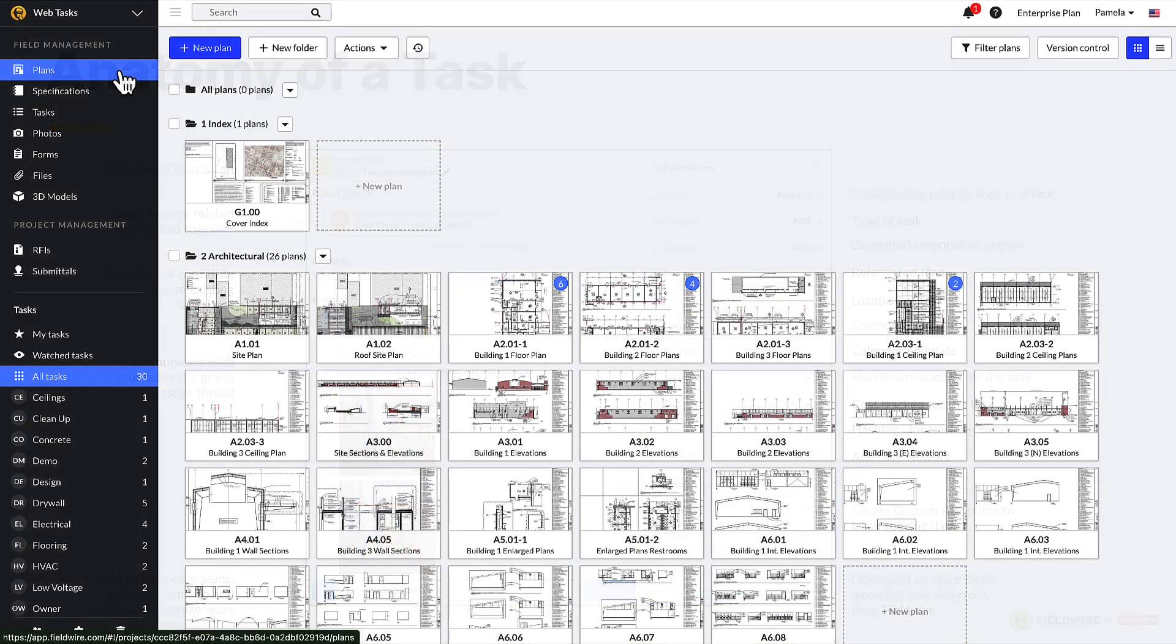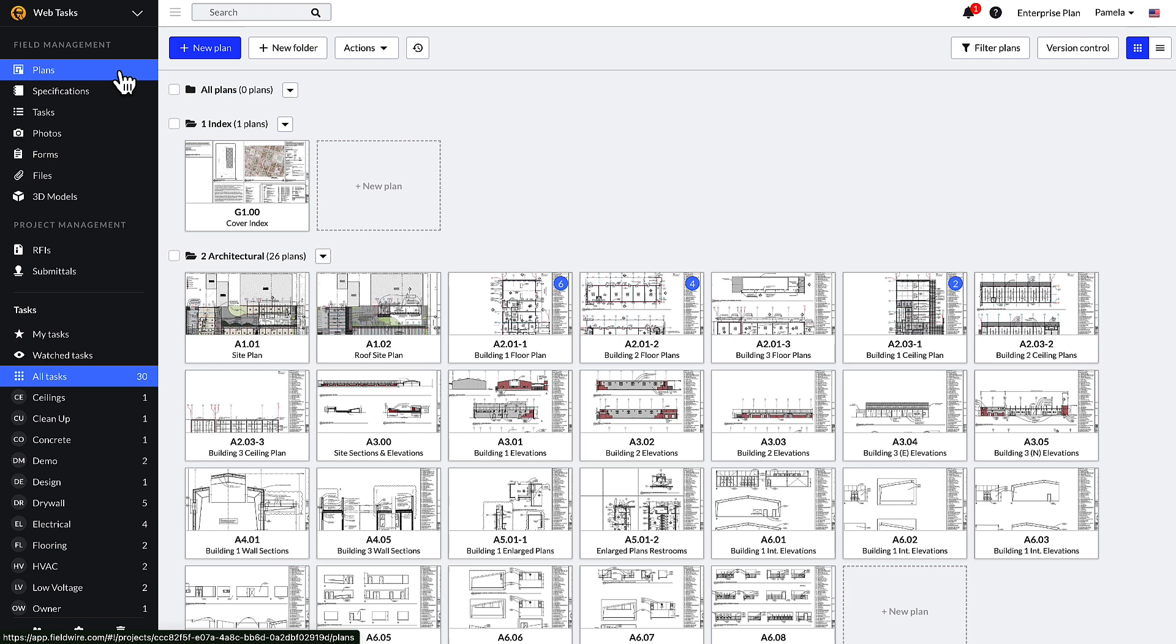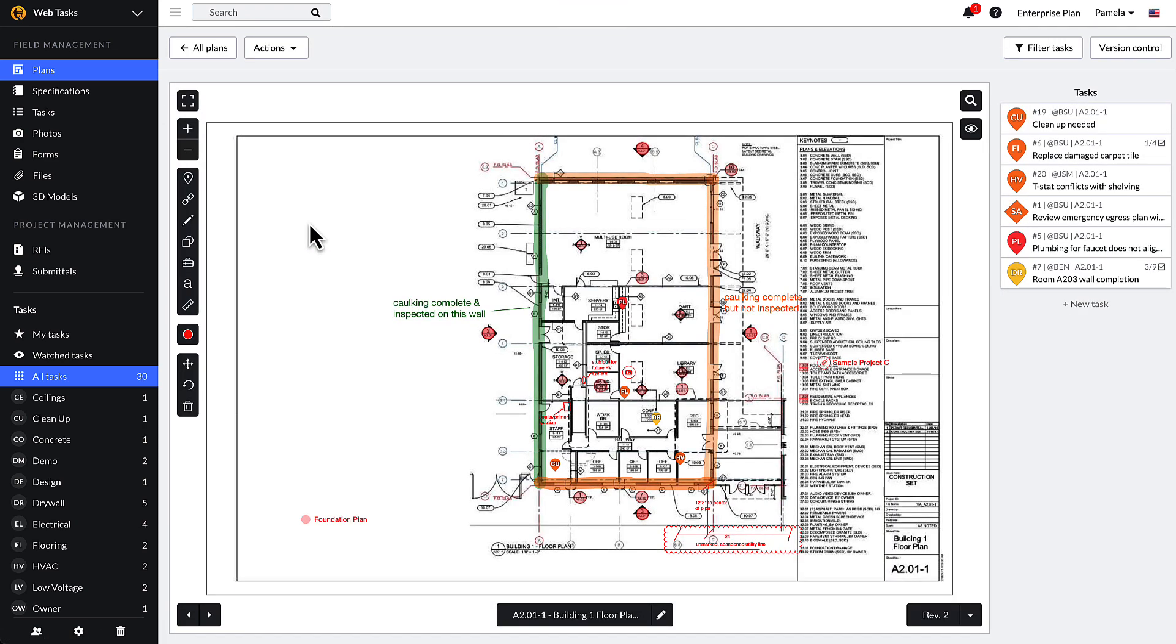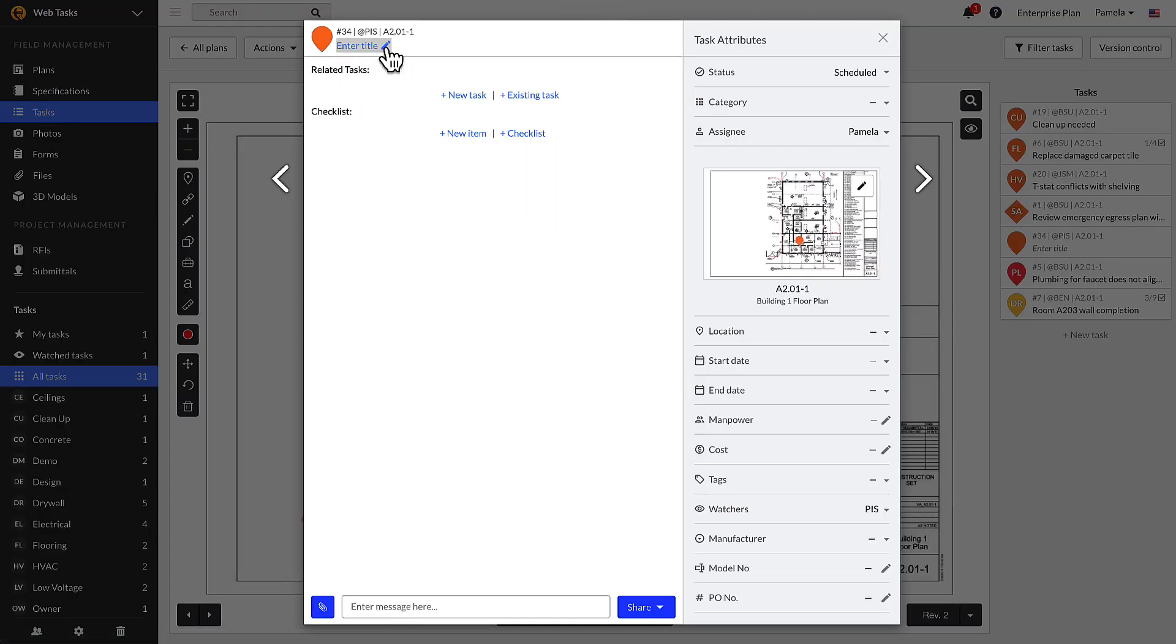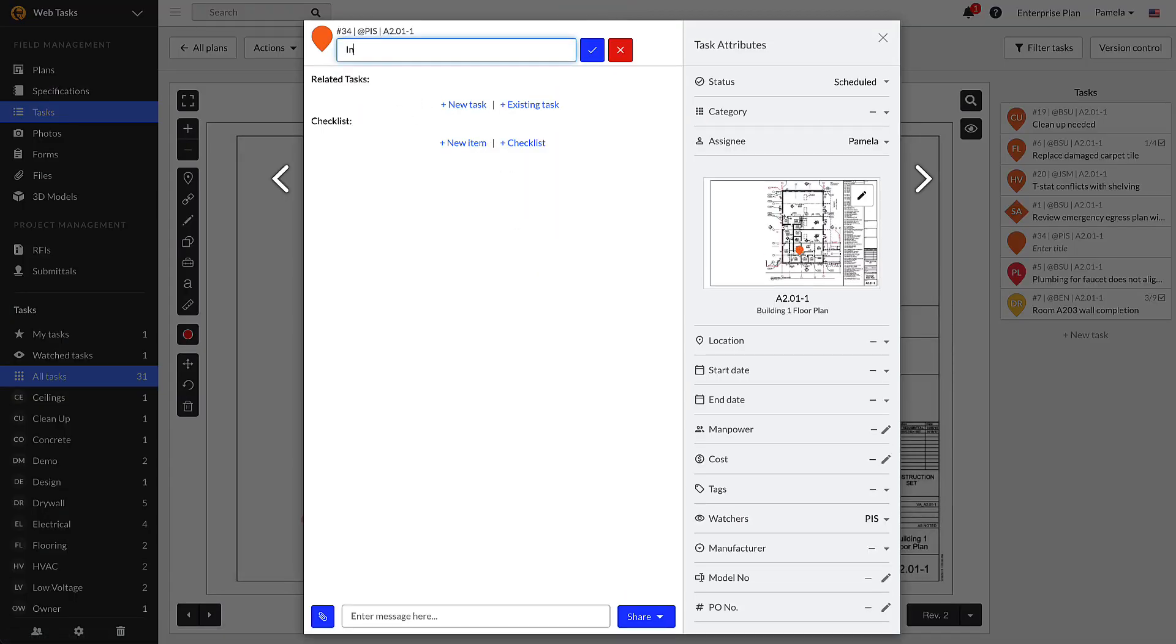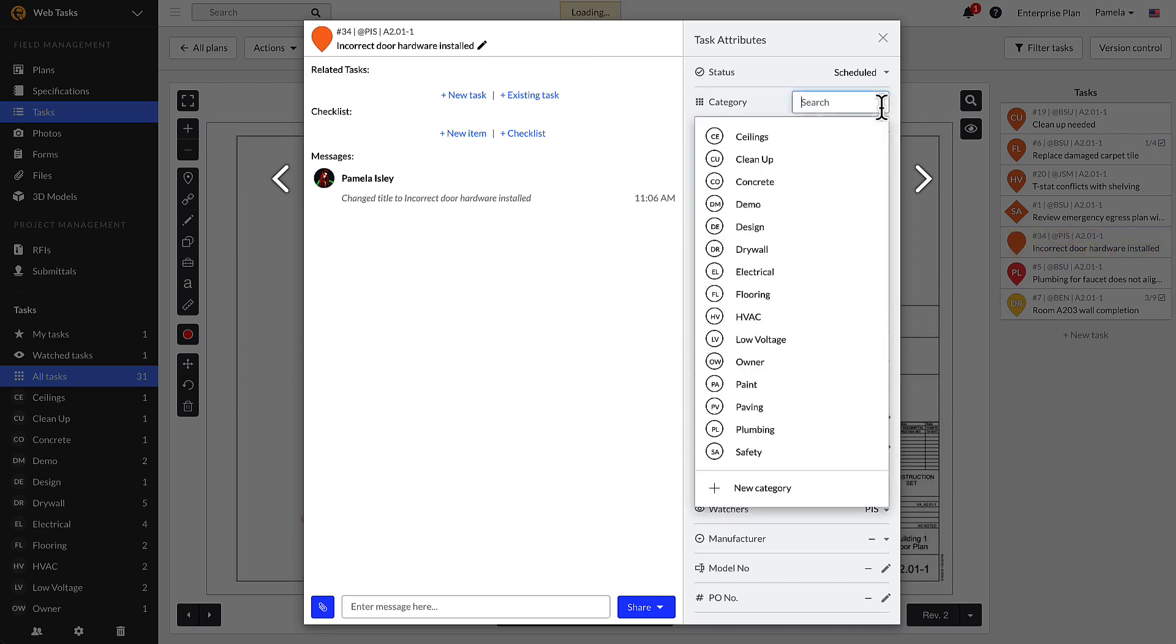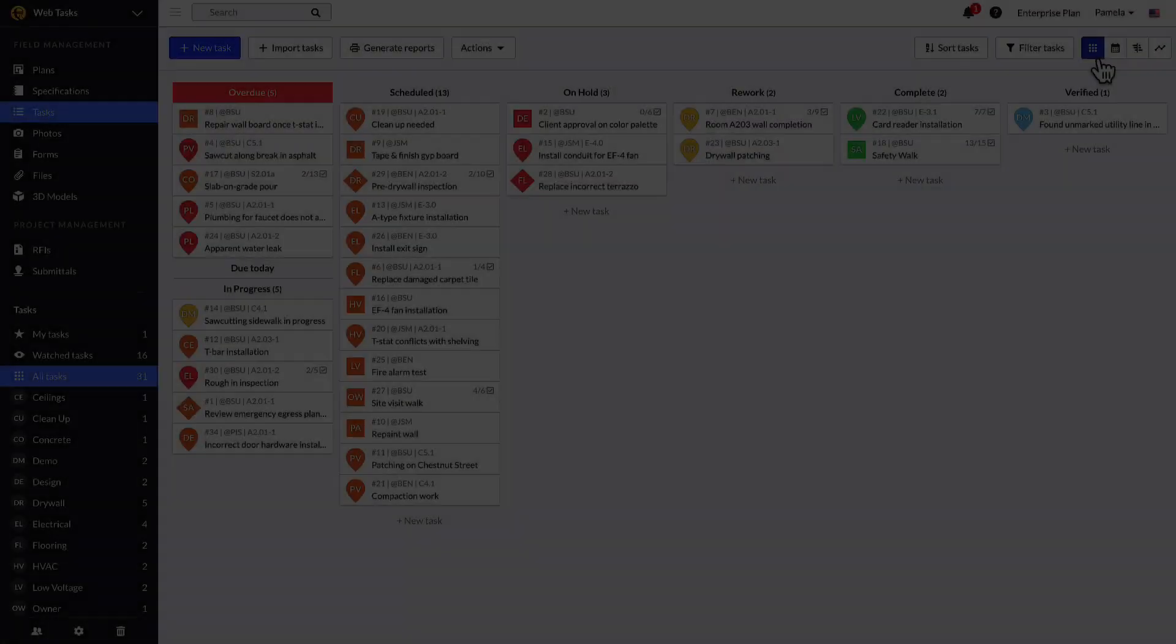First, let's go over creating a task on a plan sheet. Navigate to the relevant plan where the task is to be located. Click the teardrop-shaped task icon on the markup toolbar, and it will highlight blue, meaning it's activated. Then, click anywhere on the plan to create a new task and populate its attributes to contextualize your work.